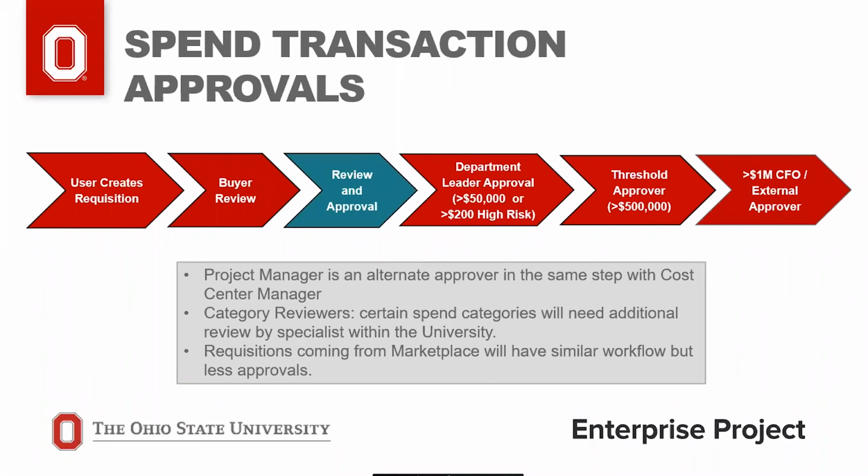Spend transaction approvals. There is an approval workflow for spend transactions on projects. Transactions are reviewed by approvers according to the Workday security roles. Routing for the project manager approval with requisitions or supplier invoice approvals is part of the security. Those transactions initiated in Workday are approved in Workday, even if that is an eBuilder managed project. Those initiated in eBuilder and integrated over to Workday are integrated as approved.